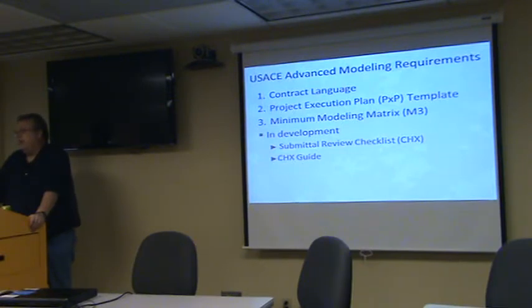So my suggestion to you is just build it into your cost and say, hey, look, if you want this level of detail for an existing building, I've got to go out and survey your building. And surveying your building isn't necessarily just doing a laser scan or a photogrammetric mesh model creation. You've got to go out and validate a lot of that data, because a lot of that data doesn't exist. You've got to figure out when this air conditioning unit was put in and who made it.